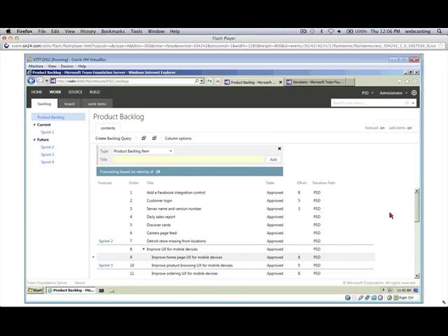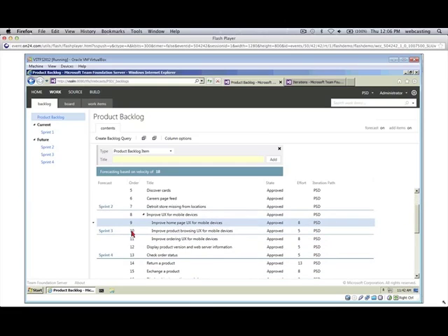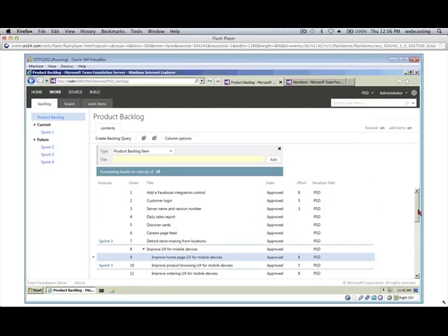And then sprint 2, and it's just totaling these numbers up to where they still fit, at or under 18. It's not supposed to be a tool that you just blindly use to forecast the work for a sprint. It's supposed to be yet another input for the conversation.